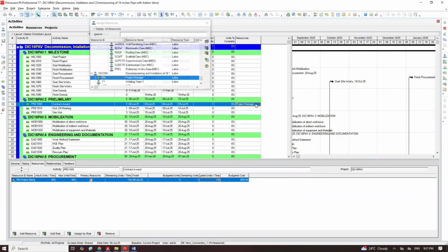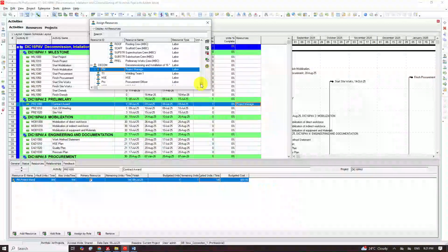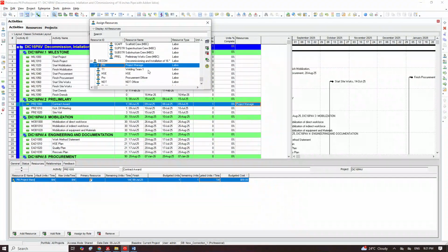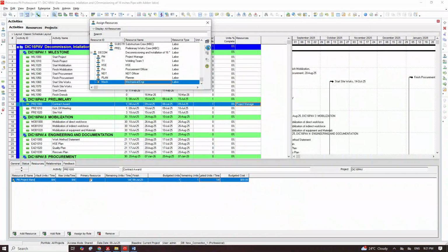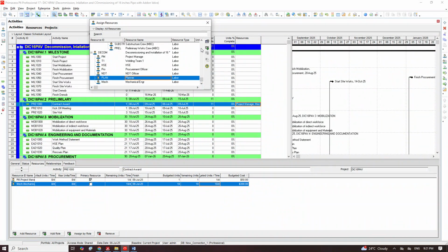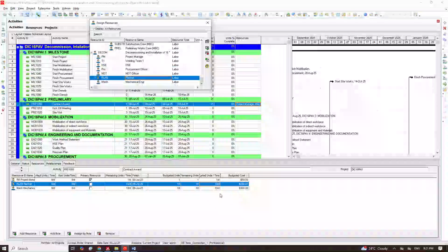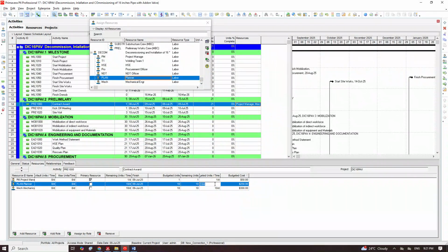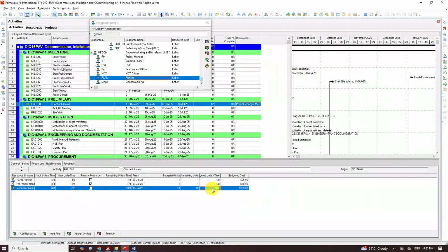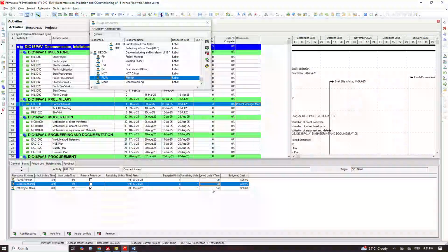So I want to add another person. Okay, I'll just click here as well. Then I will add the planner. The planner should also be in this. I will add the planner or mechanical engineer, and all of them are going to work for 1 hour. So I will come here and say, you are working 1 hour, then you are working 1 hour. So I will type it manually. Despite the fact that they have the ability to do this job for 8 hours, for the course of this particular activity, they are going to work only 1 hour.